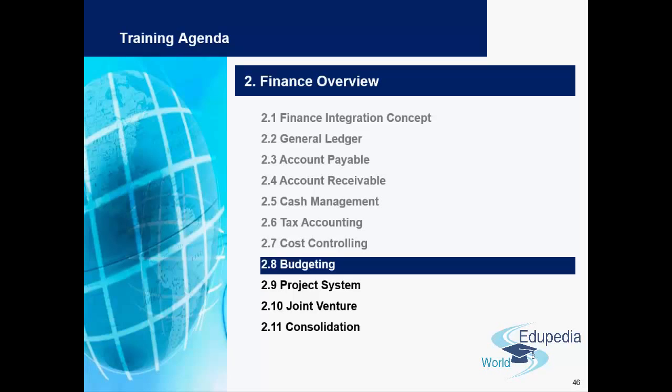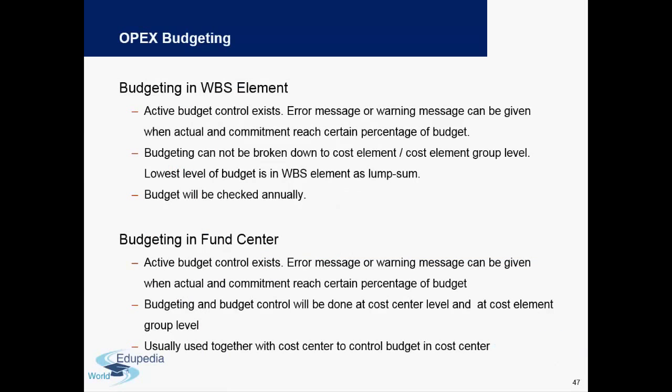Hello everyone, thank you for watching Edupedia World videos. Until now we have covered under SAP Finance the topics which are already grayed out on the top. We will now continue with budgeting. Budgeting is done under two different formats: one is budgeting in WBS element and the other is budgeting in fund center. WBS elements are nothing but Work Breakdown Structures. Active budgeting control exists — error messages or warning messages can be given when actual and commitment reach a certain percentage of budget.